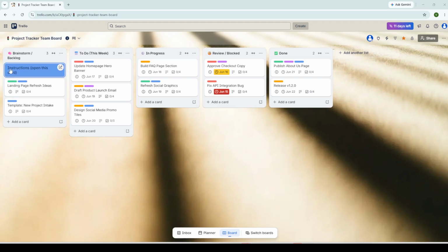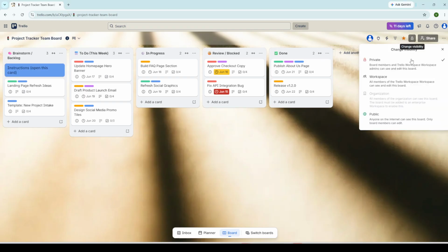Go ahead and add your teammates right away by typing their email addresses. This saves a headache later when you start assigning tasks. Once that's done, click Create New Board inside your workspace. Name it something specific and descriptive, like Q2 Content Calendar or Website Redesign Project Tracker. A good board name tells anyone who looks at it exactly what work lives there.